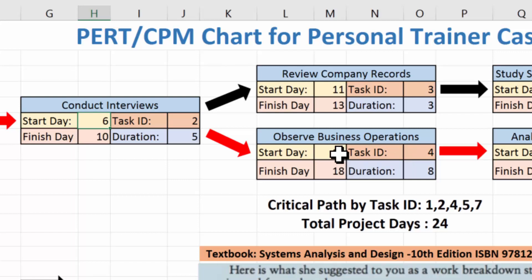Similarly, observe business operations also starts on day 11. Counting eight days: days 11 through 18 — that's eight days finishing on day 18. So we are now into 18 days of our project.